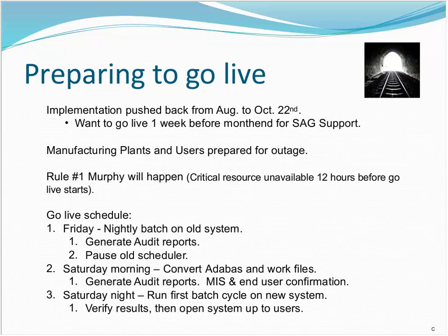And the first thing we do is we've got to run all of our same reports again because we've got to confirm that the numbers all match. So we make sure that it all matches, and the numbers are all good, and we get in and we run some of the online programs, some of the batch programs, make sure it looks good, and it's all fine. And then Saturday night, we'll run all on the new system, and we'll make sure the numbers look good, and if it's good, Sunday morning we'll let the users in.